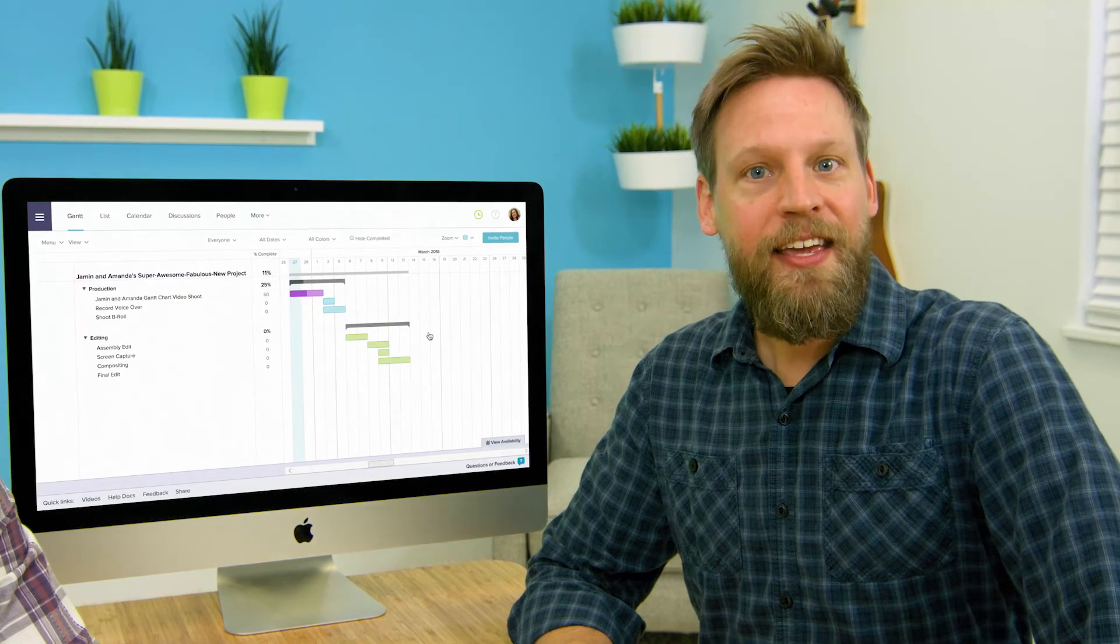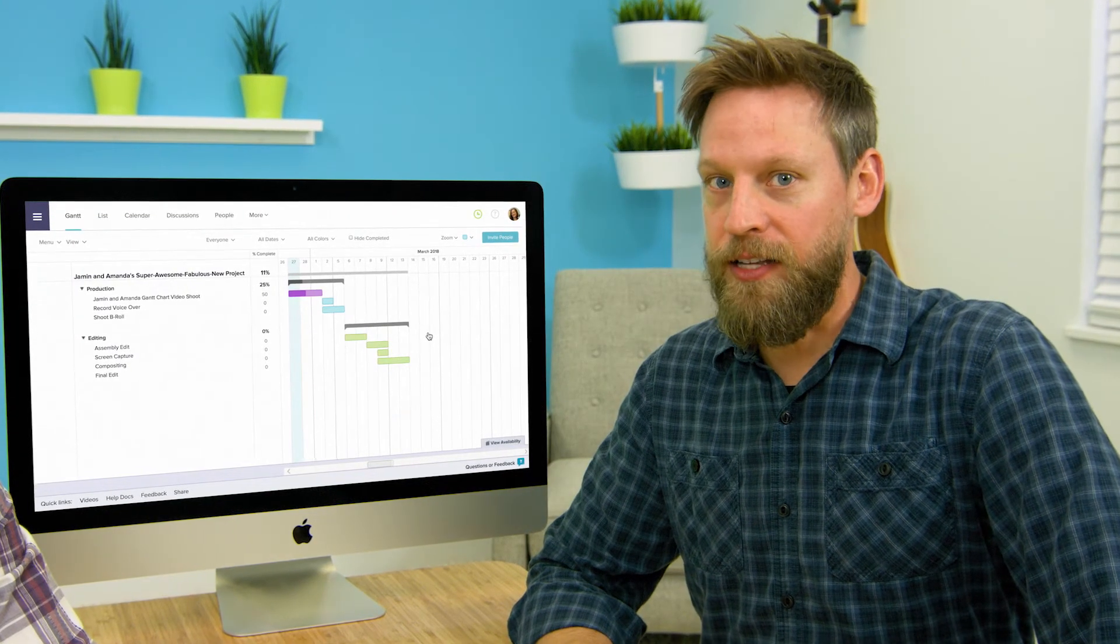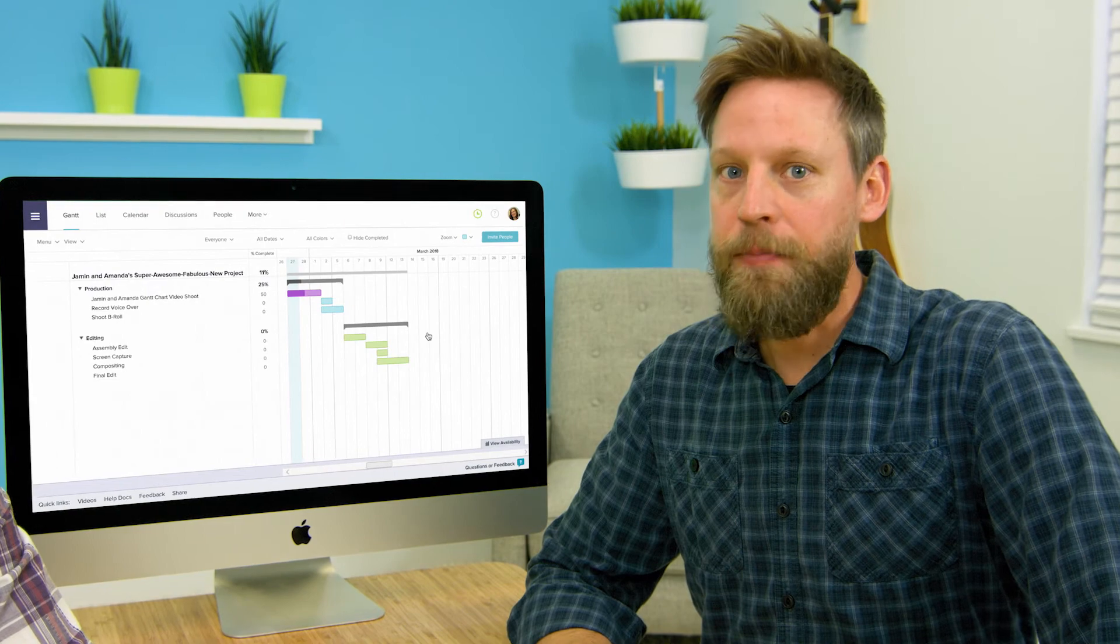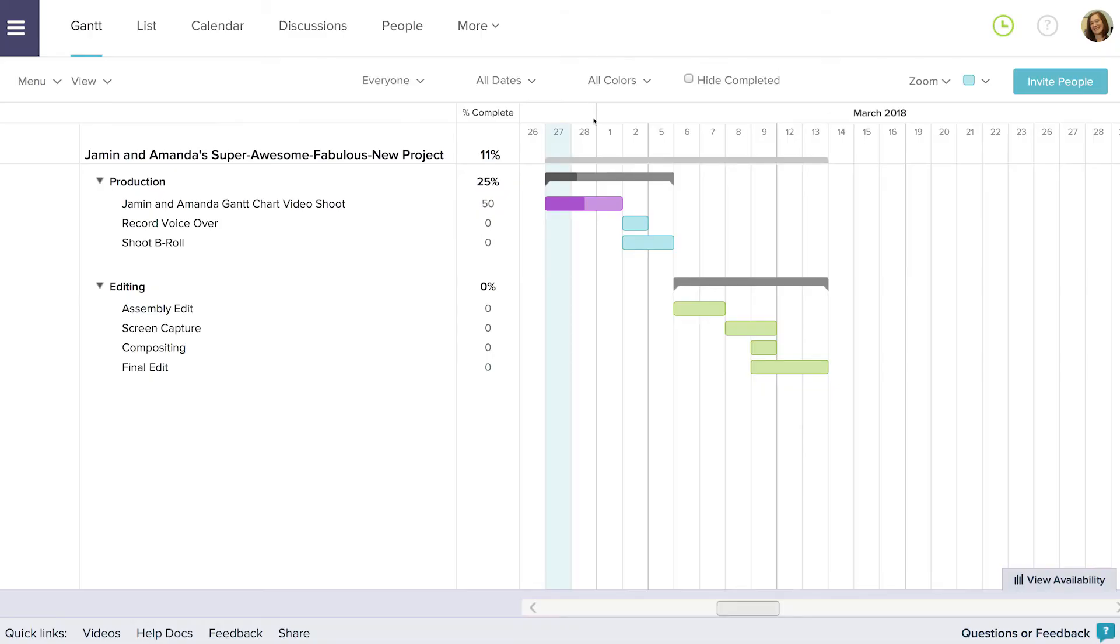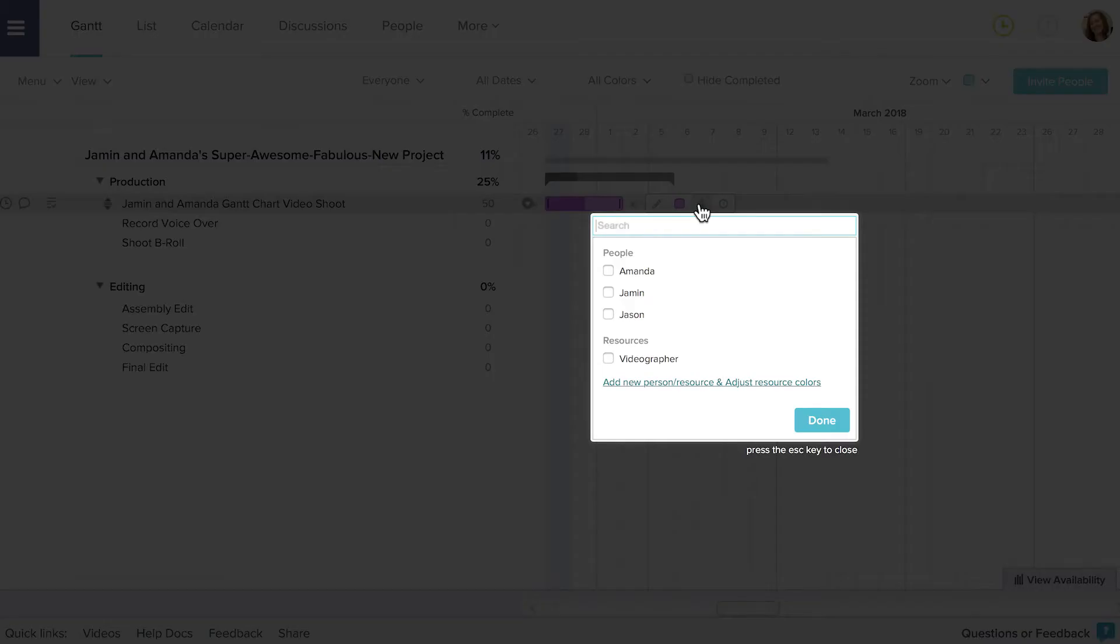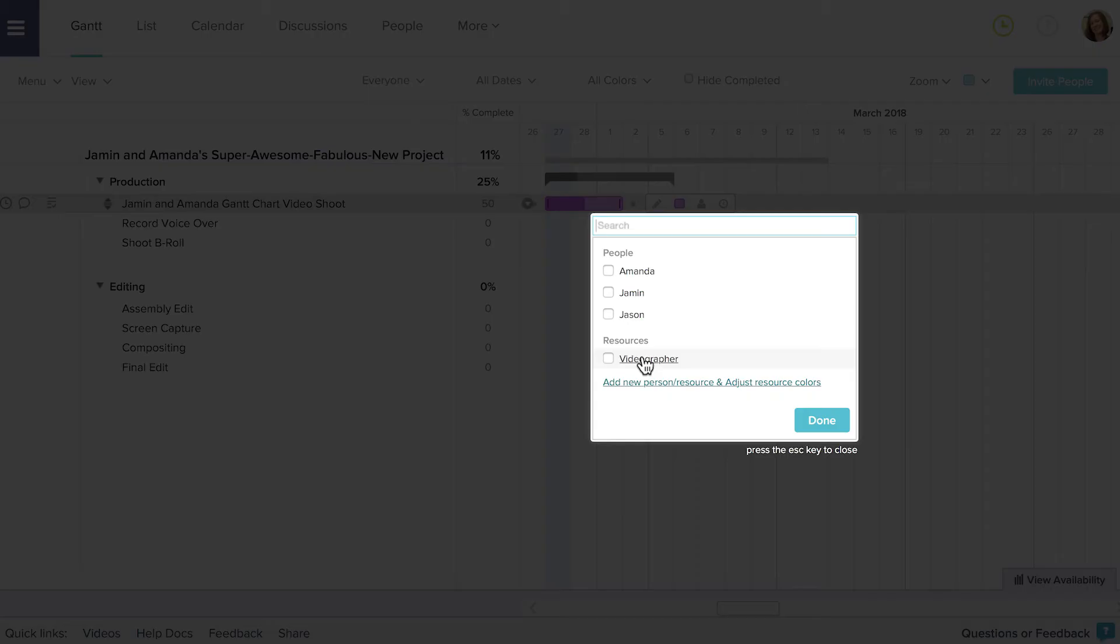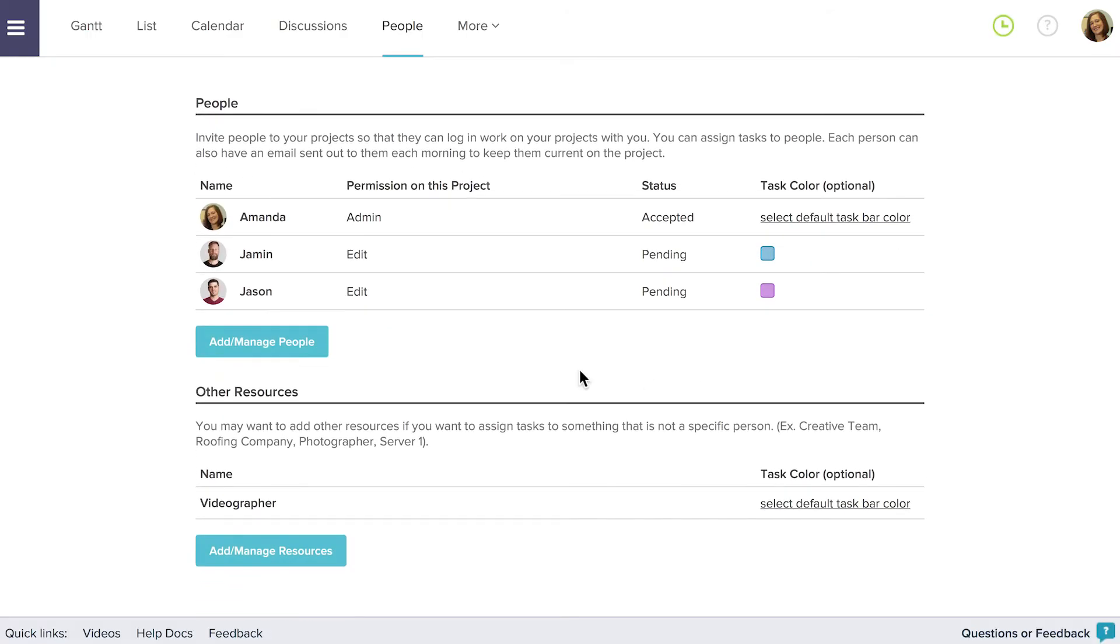People and resources are the key to getting the project done and adding them is super easy with Team Gantt. Just mouse over the task bar that you want to add a person or resource to and click the person icon that appears to the task bar's right. Any person or resource that has been added to the project is available to select right away. If you don't see the person or resource you're looking for you can add them by clicking add new person resource and adjust resource colors or by clicking the people tab. Then click add manage people or add manage resources to add the person or resource to the project.